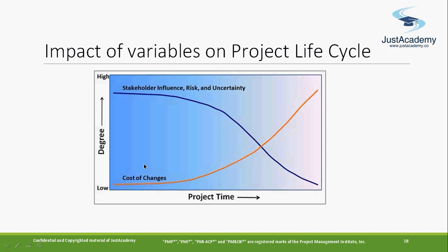But here, the cost of changes is low at the starting. If I'm starting my project or early, if I want to make any changes, I'm okay with that. The cost of changes will be less. But as soon as the project nears completion, the cost of changes will be very high. If I reach this stage and somebody asks, hey, we want to change the design or something, that's very difficult to do. But starting here, I'm able to manage it because if I'm starting, I can take care of it.